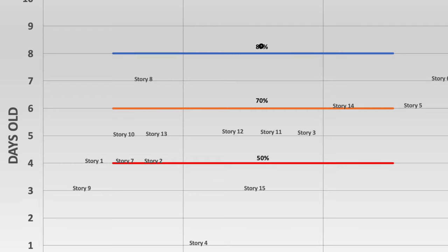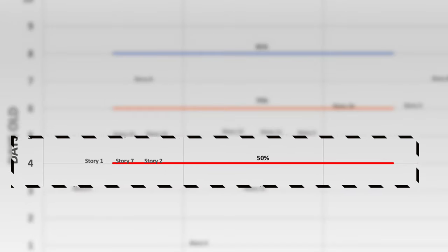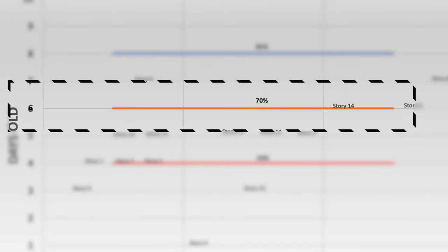Remember from our previous videos we want to work to the 85th percentile — that's our forecast for delivery, representing an 85% probability of a story actually completing. In our example here, that's eight days. On our aging chart we can see the 50th percentile is four days, the 70th is six days, and of course the 85th is eight days. Remember, it's only when our work is active in progress that we can actually do something to ensure we improve or hit our forecast. Once it's complete, it's too late. So we need to quickly check the age of each story in progress and take action if necessary — I'd strongly suggest doing this at the stand-up.